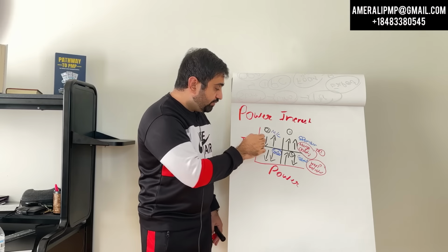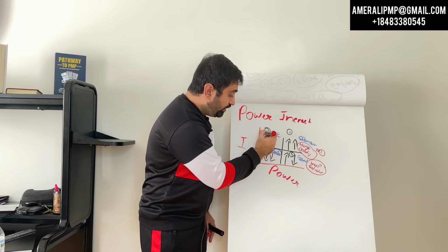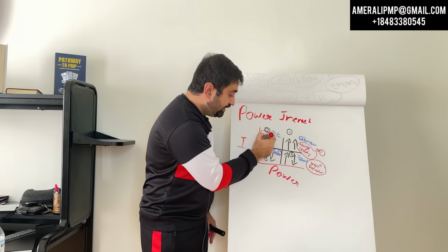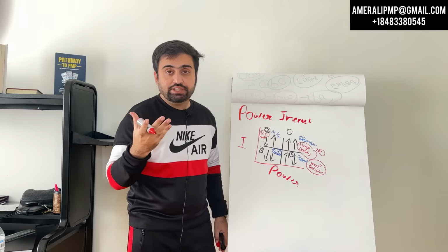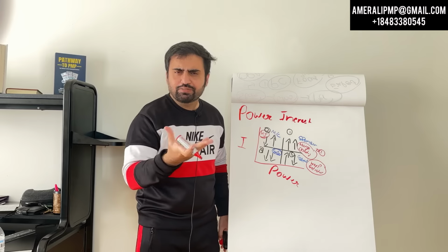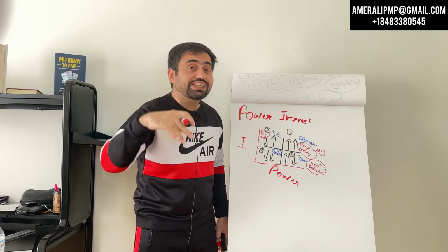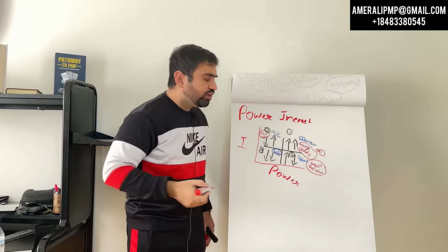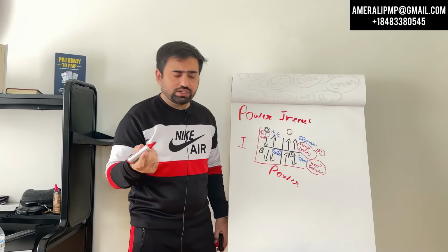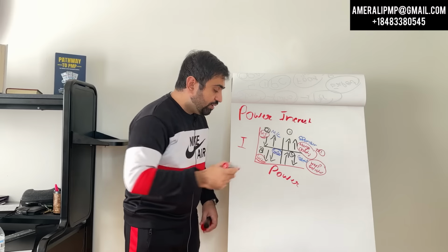Now let's see those stakeholders having no power but interested. We need to keep them informed, otherwise they will spread negative words. We also need to manage them, keep them informed, maybe give them second-hand information. I don't know, you choose, but keep them informed. Those stakeholders who have no power and are not interested, put them into a watch list.